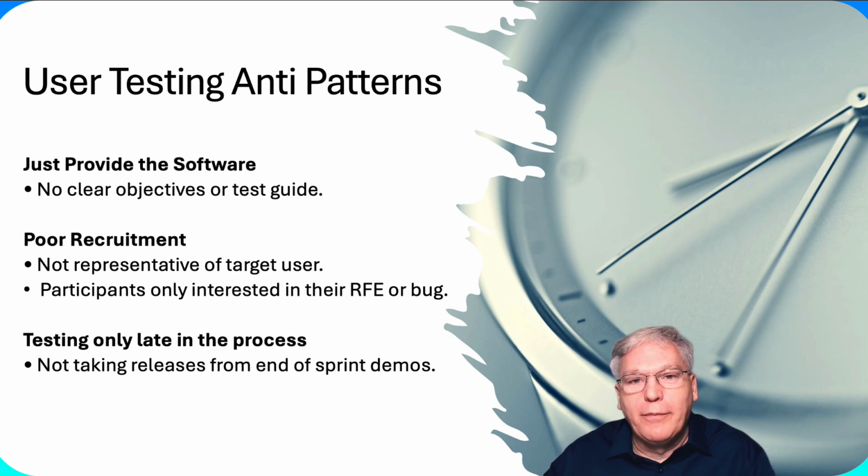It should be part of the project plan. The Scrum Master should be on top of that because it does take some work, and you do need lead time to recruit people and get them lined up to do it. So it's important to think about that ahead of time.